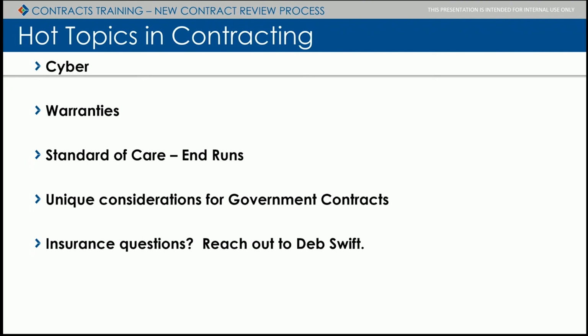So it depends on when the claim's made. The insurance coverage has to be in place at the time the claim's made. And if the claim can be made up to 10 years after the end of the project, then you need to have that project-specific insurance in place up to the end. So, $50,000 to $80,000 over 14 years, that's a very, very expensive consideration.